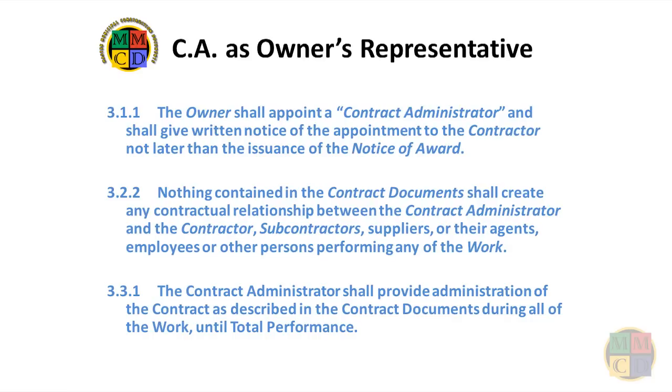GC 3.2.2 makes it clear that the contract administrator only has a contractual relationship with the owner. But that's a separate issue than the duties that the CA owes to all parties as part of the CA's job.